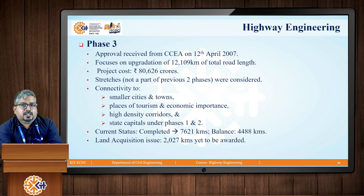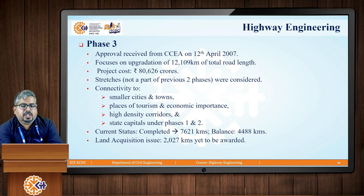The current status of Phase 3 shows that the completed road stretch is around 7,621 kilometers, while the balance is 4,488 kilometers. However, there is a certain issue regarding land acquisition, due to which 2,027 kilometers is yet to be awarded.